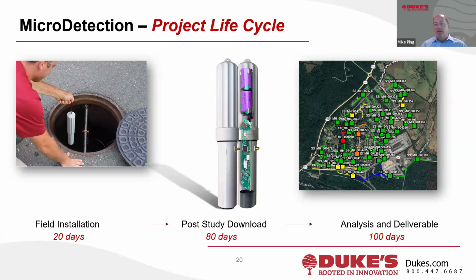Generally speaking, certainly the eastern half of the United States, these projects last about 60 days. We set them up for 60 days, 2 months. And then out in more arid areas, especially the Southwest, we have a contingency built on, and sometimes they last 90 days. We've had a few that needed to go on longer than that, but it's actually very rare. So, I would say 90% of these things are 60 days.